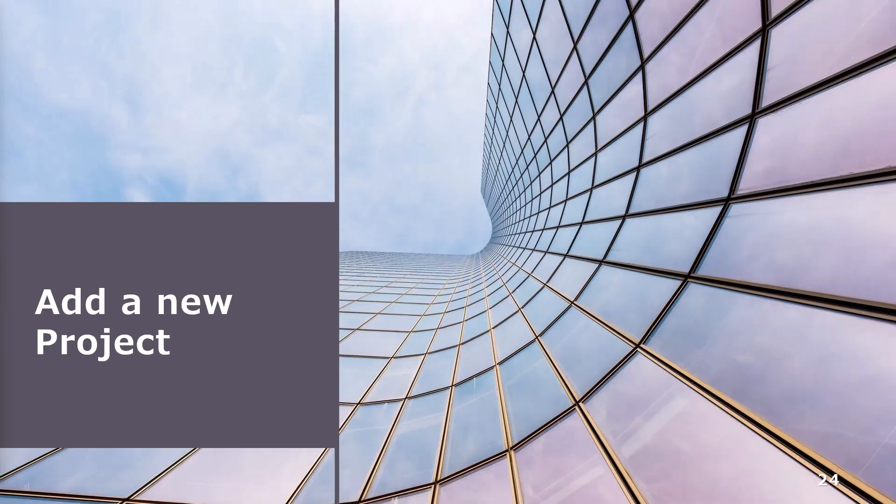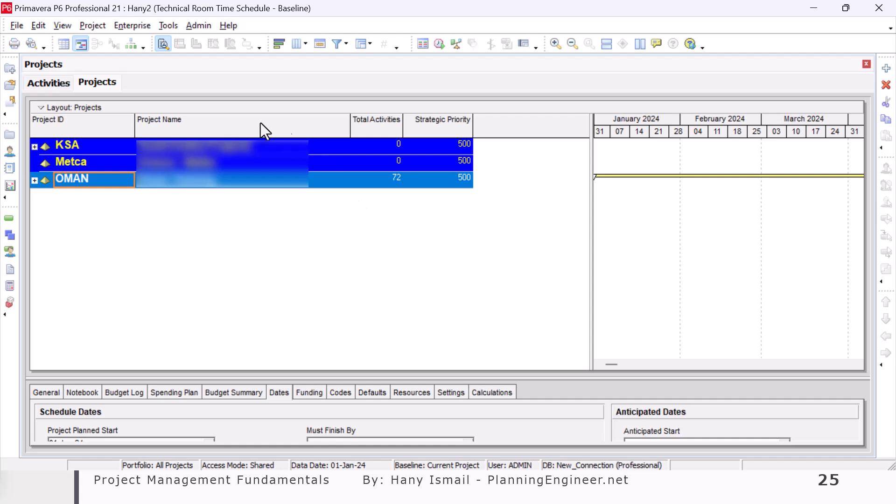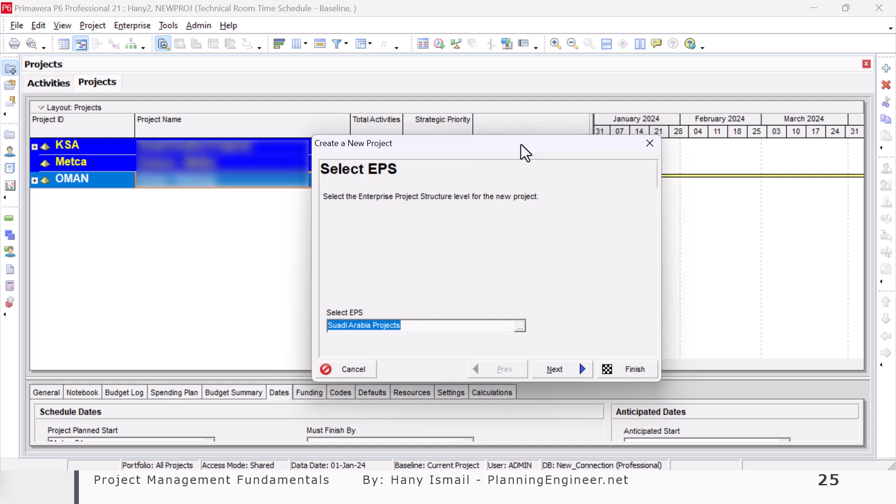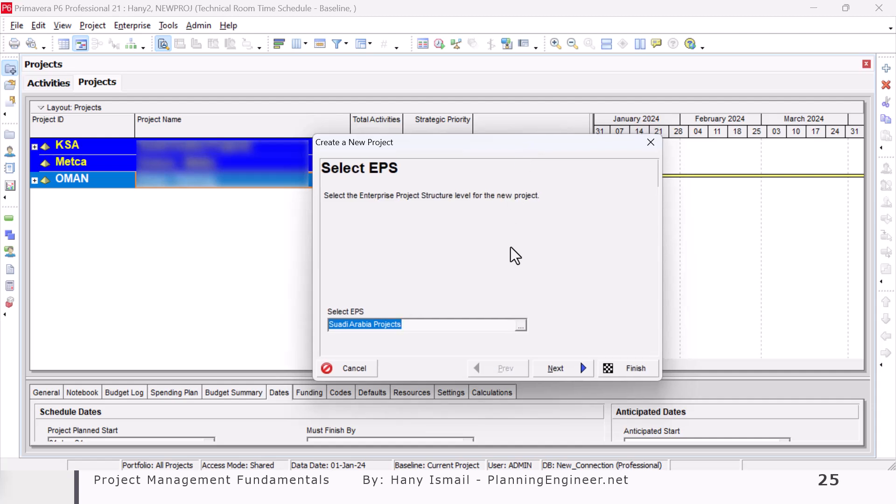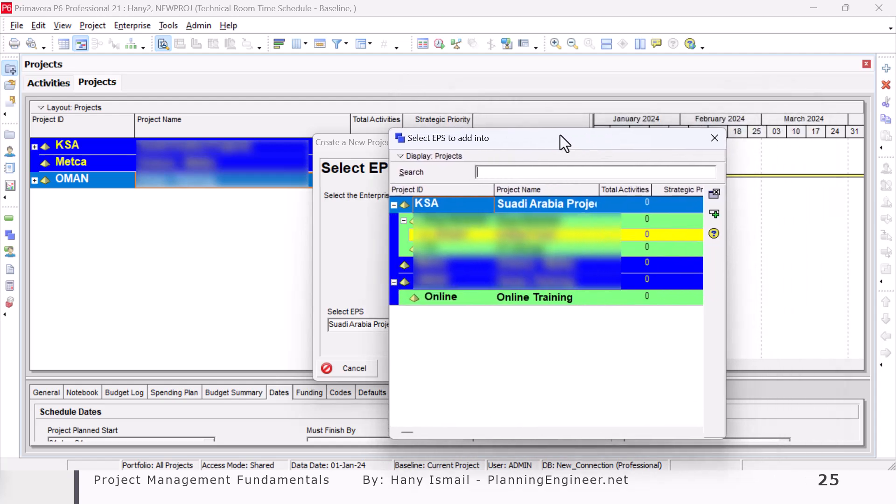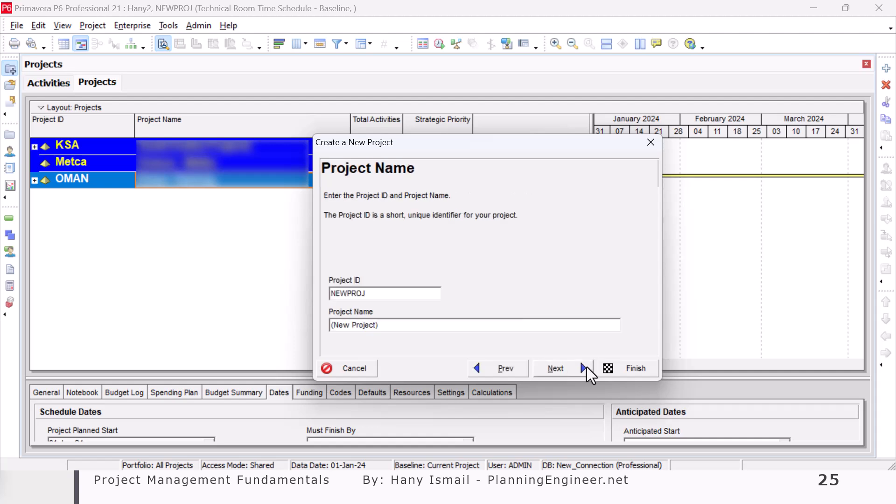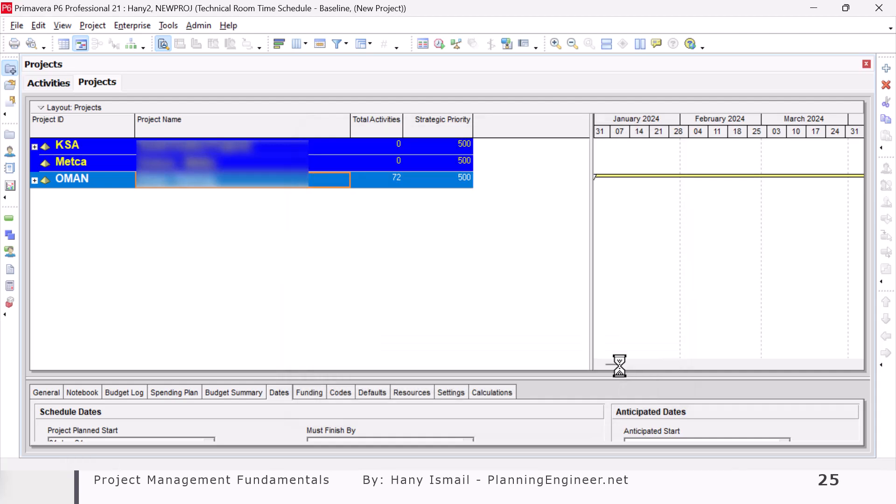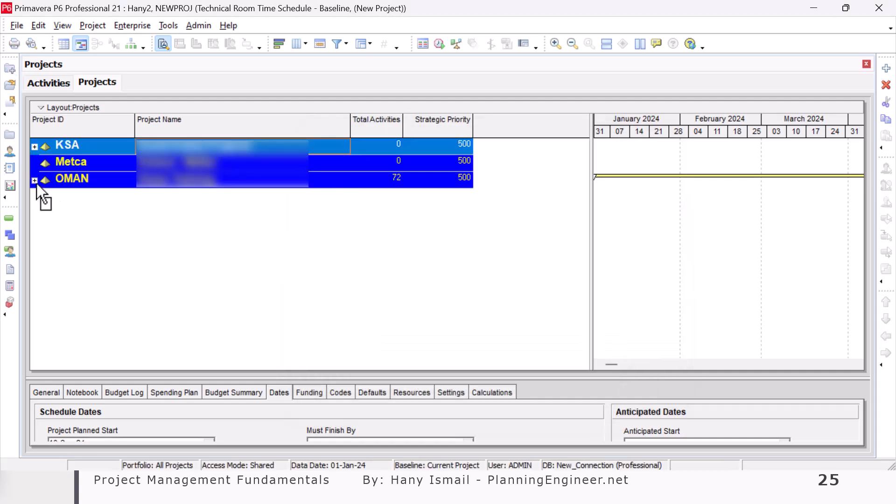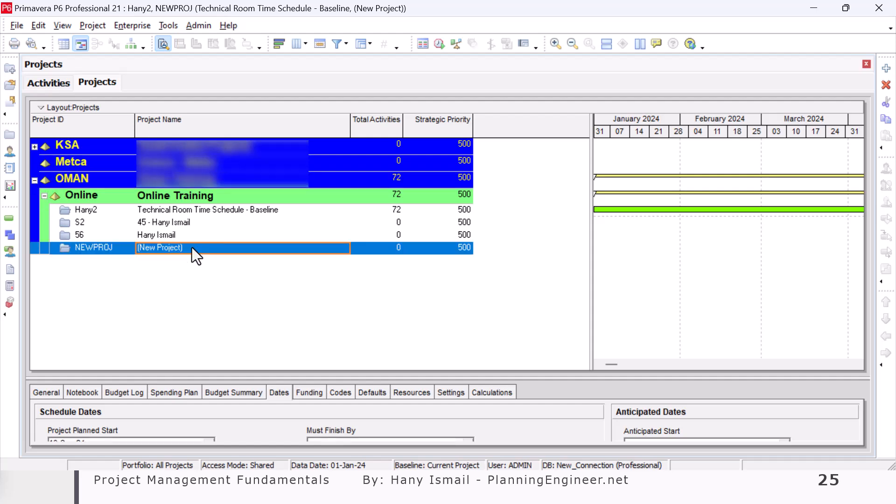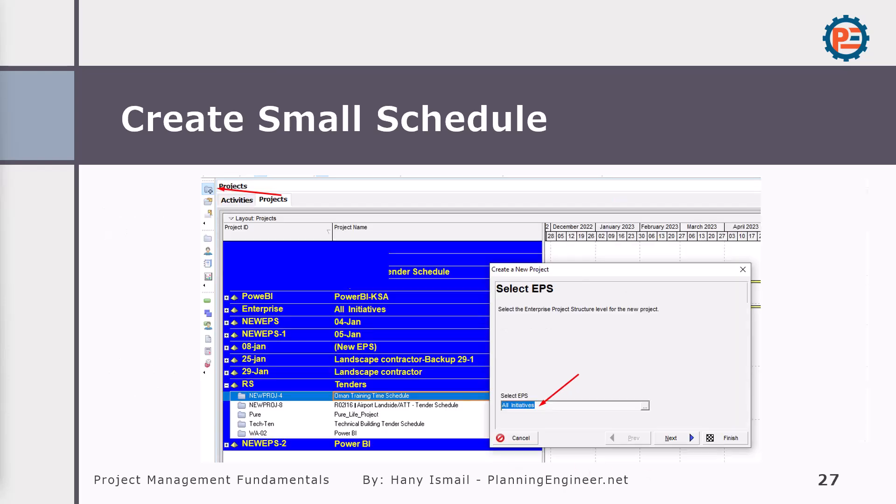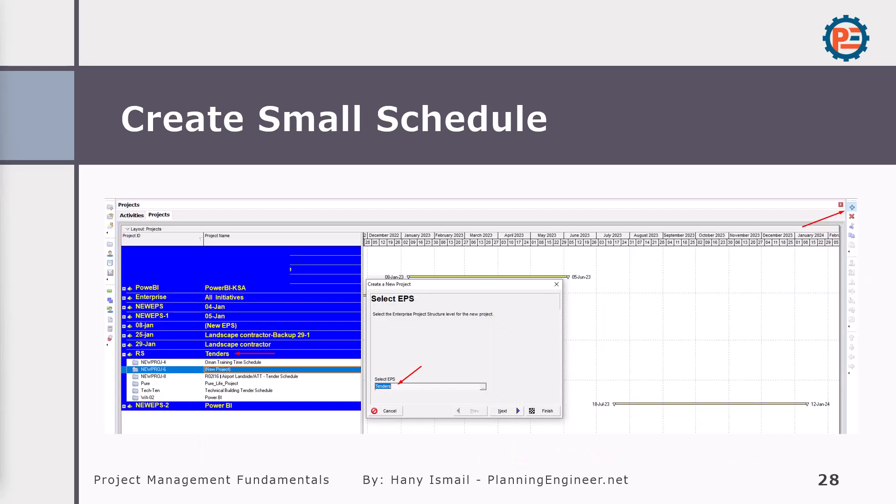So let's add a new project and see how simple it is. To create a new project, click on new or add as simple as this. So let's say I would like to add a new project. I simply click add new and then the Primavera will ask me where you would like to save your project. Then I will select the EPS or enterprise project structure, which is very simple organization that I can see here. Let's say I will put it here. Then I'll click next and finish. Now here I have a new project which was created here. Very simple. So as we discussed that after clicking new, we'll select the EPS and then we have our project created.